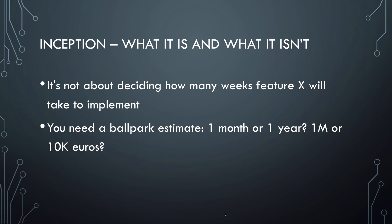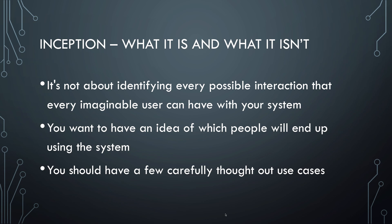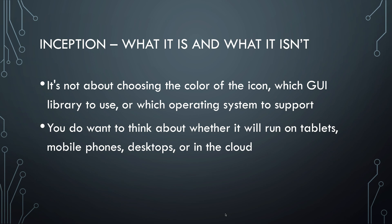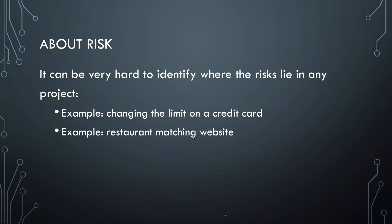Inception is not about setting up a very precise project plan, but more about establishing a rough outline of the entire project without going into much detail — how long will it approximately take and how much does it cost? This is not the stage where you map all possible user interactions in detail; you're just trying to get an idea of who is going to use the system. Inception is not about deciding on icon colors, button margins, or which specific libraries you use. It's about deciding what platforms the application is supposed to run on — is it a mobile app, a website, or embedded software in a TV set? You need to think carefully about the risks of a project and the overall design decisions you make.